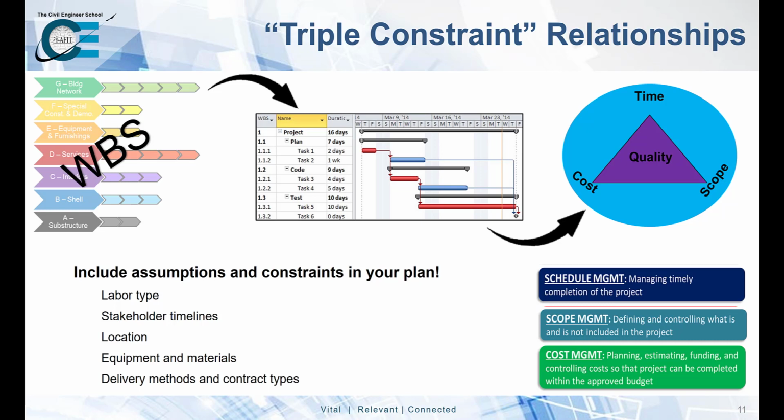Imagine you are tasked to replace an HVAC chiller at a communications facility. Likely, you will need to have the new unit installed and operating before you decommission the old unit. How these tasks relate to one another is critical in producing an accurate project schedule. The time it takes to install the new unit will drive the duration the old unit is still operating.